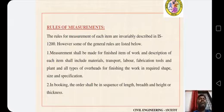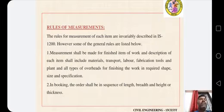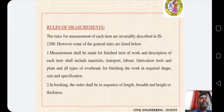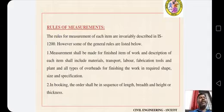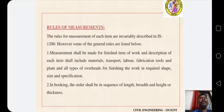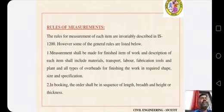The Rules of Measurements of each item are invariably described in IS-1200. Some general rules are listed below. First, measurements shall be made for finished items of work and the description of each item shall include materials, transport, labour, fabrication, tools and plants, and all types of overheads. For finishing, the work is required in shape, size and specification. In booking, the order shall be in sequence of length, breadth and height or thickness.